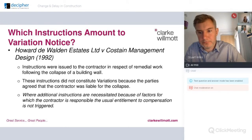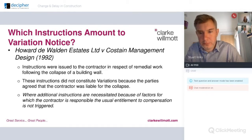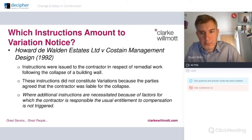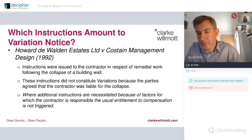I want to run through a few cases to explain how important it is to understand the notice provisions — particularly the timings. Even if you have a watertight case in terms of entitlement to delay and loss of expense, if you miss the strict contractual requirements in terms of notifying, you can be precluded from bringing that claim, however harsh that might seem. In Howard, Walden Estates and Cost Day Management from 1992, instructions were issued to the contractor following the collapse of a building wall. These instructions did not constitute variations because the parties had agreed the contractor was liable for the collapse. So unsurprisingly, where additional instructions are necessitated by factors for which the contractor was liable, you won't get compensation.